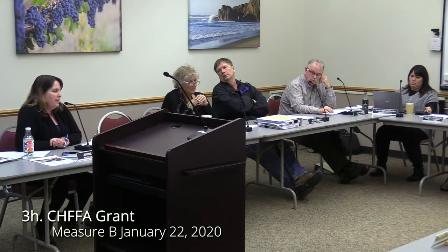So yes, that is an old resolution that got attached. It is not the most current resolution. The current resolution is resolution number 4. That is the resolution from 2018. We have a resolution from December 2019 that's more current, that has the requirements that, one, we have the Nocton Lewis contract in place, two, that we have something from the board stating the property will be built on Orchard Street, and it still has the May 2021 opening, constructed and opened by, and we will be changing that. So that's a very old amendment, and none of that is current today.